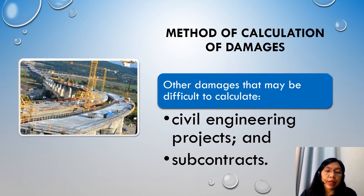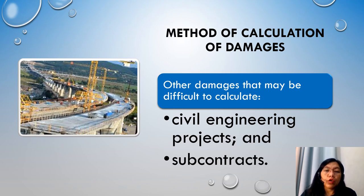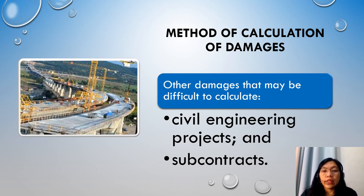Other damages that may be difficult to calculate include civil engineering projects and subcontracts. It is more difficult to calculate damages for civil engineering projects such as roads and sewage treatment facilities, because it may be difficult to put a value on the loss incurred — for example, for not having a road upgrade. It may also be difficult for a contractor to calculate the level of damages to be applied within a subcontract, since the delay of a subcontractor must be considered for its impact on overall project completion. The damages may become disproportionate to the value of the works covered by the subcontract, which is why some contractors prefer to enter subcontracts with unliquidated damages.